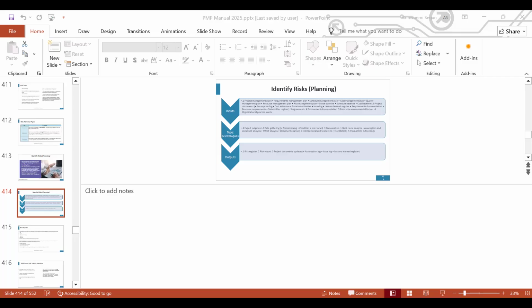So this is an example of a risk register. A risk register is used to identify risk and also analyze and respond to risk on a project. This is a risk register for an open air event. An event management company created it when they got a contract from a political party to help them organize one of their political campaigns sometime in April next year.